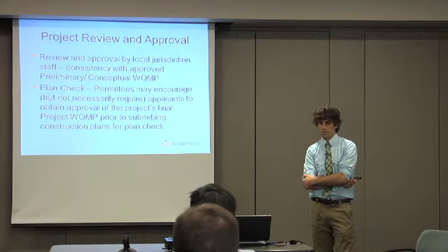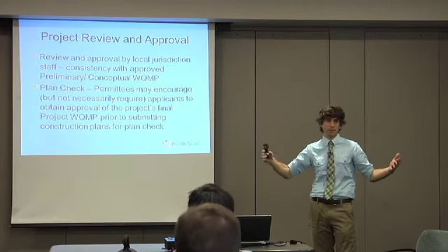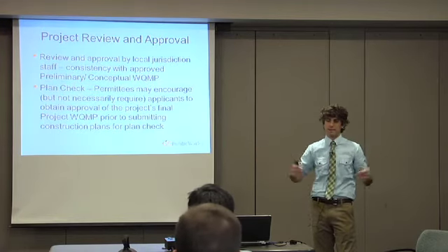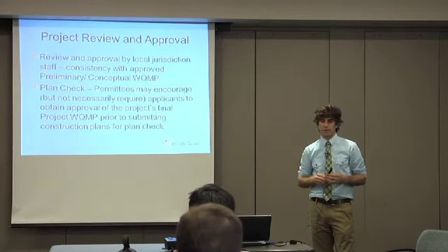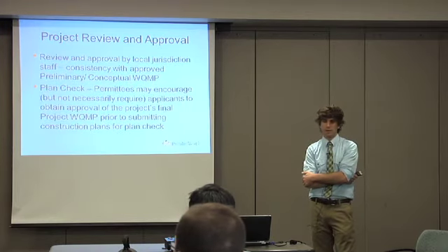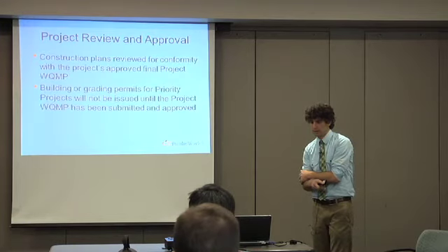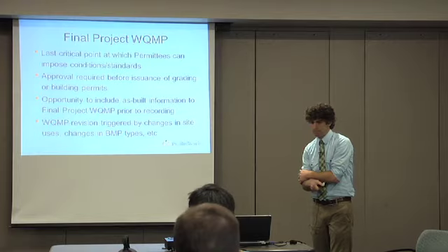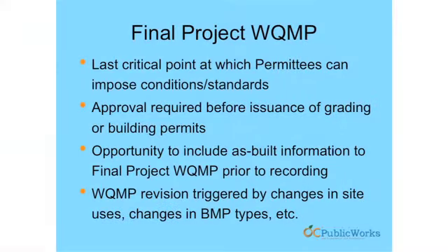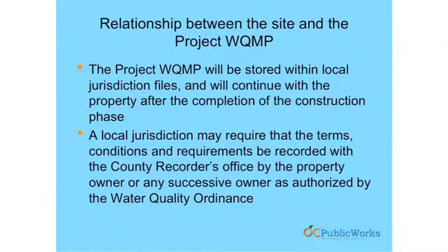A lot of times what folks are asking for is that as part of the grading sheets, they have a WQMP map that's over the exact same base, simply adding additional detail about the BMPs themselves, but on the same exact base grading. And I think the most important thing is that the WQMP is approved prior to the issuance of any sort of grading and building permits, and that those grading plans reflect what's required on the WQMP.